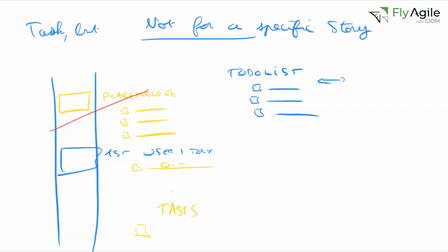When we open something like a free-for-all, let's install stuff and put all the installation we want in the backlog, what I've seen before is, first, it doesn't last just for a sprint. It tends to drag, and many things are not so useful. At least we're not focused, because we're not looking at the outcome of why we want to have a machine, why we want to have Git, why we want to have the SSH key set up properly. I like that thinking that I also see from the greatest developers. This time I'm picking it from software craftsmanship: always understand there's a business or project outcome behind everything you do technically.